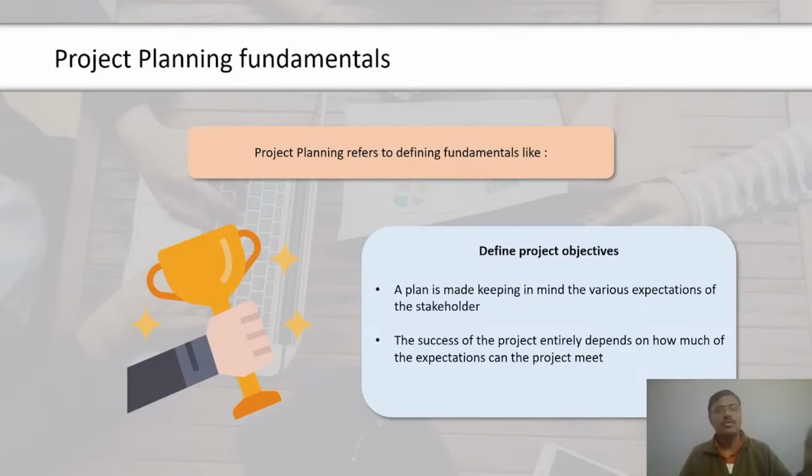In reserve analysis, once the costs are estimated, some extra amount is added to the estimate as a management reserve to take care of any unplanned activities. Expert judgment is a technique in which an expert helps to estimate the activity cost. An expert is someone who might have worked on a similar project in the past and has a good idea to estimate the activity costs involved. Historical relationships are used to predict the total project cost using a mathematical model. This is similar to the analogous estimate or parametric estimate method.